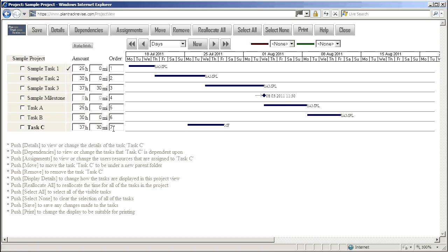Tasks are allocated as you assign them, but you can change the allocation order if required. You can now see that task B is done before task A. In the same view, we can also view the actual time worked, as entered on the timesheets.